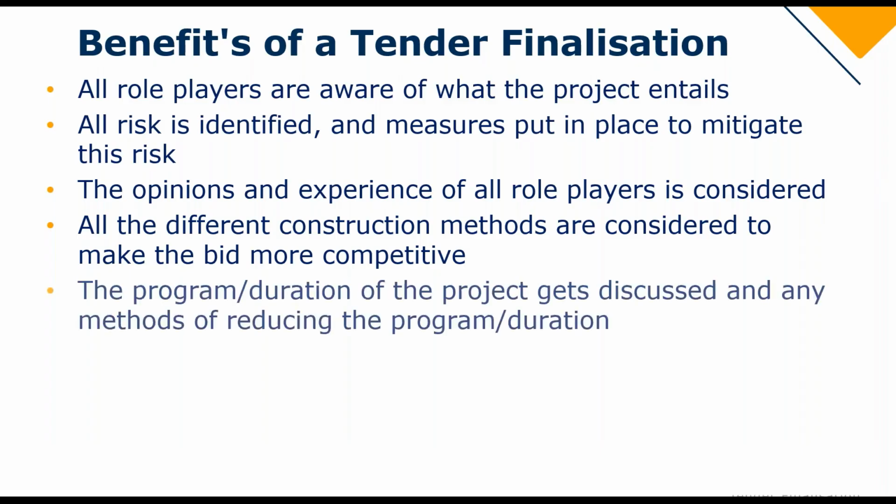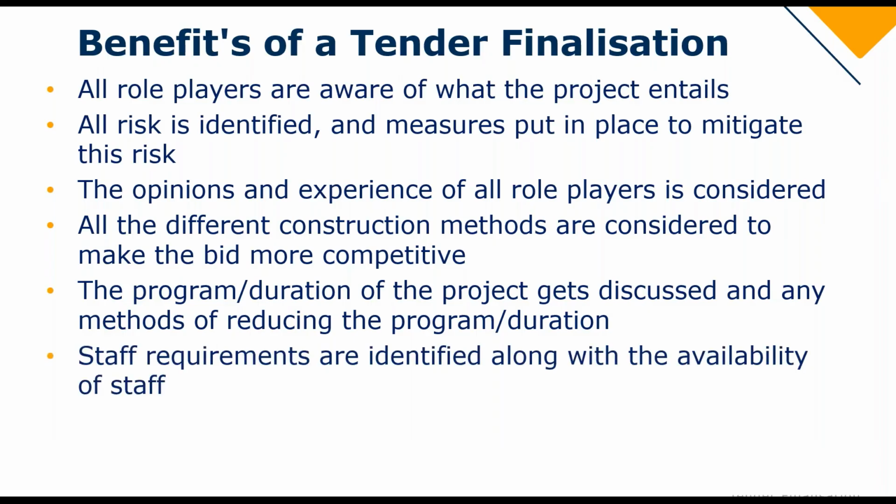They look at the different ways, and based on their experience, they can play around or adjust the way they're going to build. Next is the program or the duration of the project gets discussed, and any methods of reducing the program or the duration of the project. Staffing requirements are identified along with the availability of staff. And lastly, the markup percentage gets agreed on.